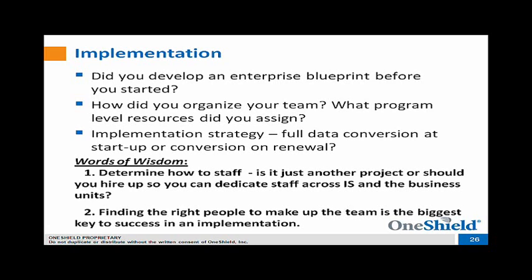Right, yes. There are different names for that in different architecture documents. But what we call it, or you call it blueprint, is that candidate architecture you're developing. And that candidate architecture, we had it spread not just for the one system at a time we're doing, policy, or not just for claims, but for the whole landscape, from policy, billing, claims, data warehousing, security, reporting, all the way down. What we want to do is develop that blueprint, that candidate architecture, and you want to use that through your whole project. So if you develop it early up front, this is where you can start drawing those components, those boundaries, what should print do, what should policy do, what should billing do, what it shouldn't do. You get some high-level functional requirements from that. You want to develop that up front, and then you can use that through the whole project.